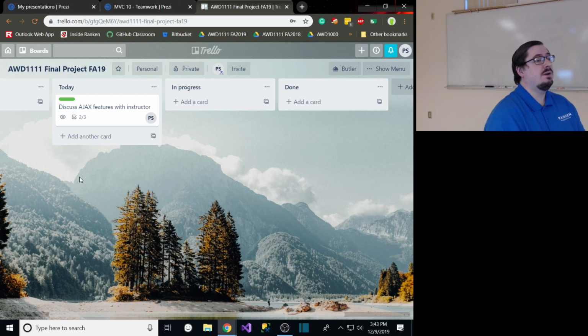Part of that is because usually when you're dealing with cards like this, every card only ever belongs to one person. Every card belongs to one and only one person. So you want to avoid breaking it up in a way where there's a dependency between two cards, ideally. If you have a change that needs to happen on the model, you need to add a column here, well, that also means changing the controller and the view.